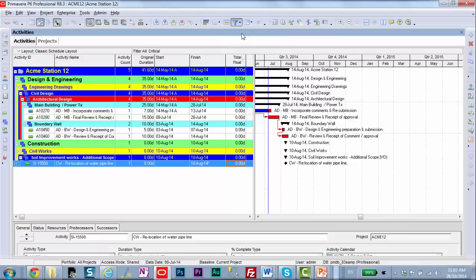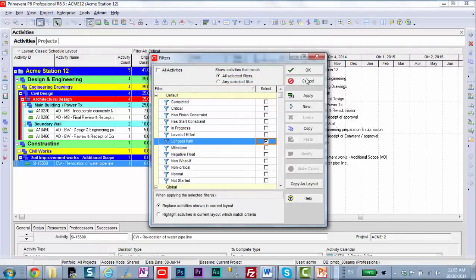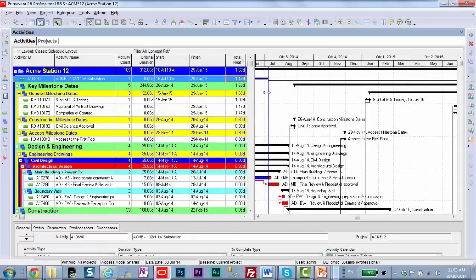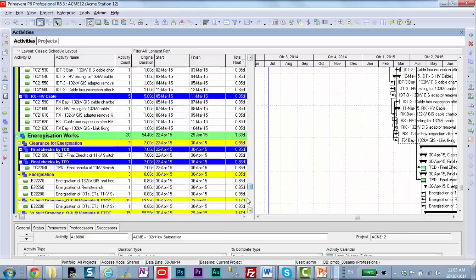Now if I go in here and uncheck Critical and turn on rather the longest path, I get a very different result. I got 109 activities. Now why is that? Why is my critical path different based on total float or based on the longest path?